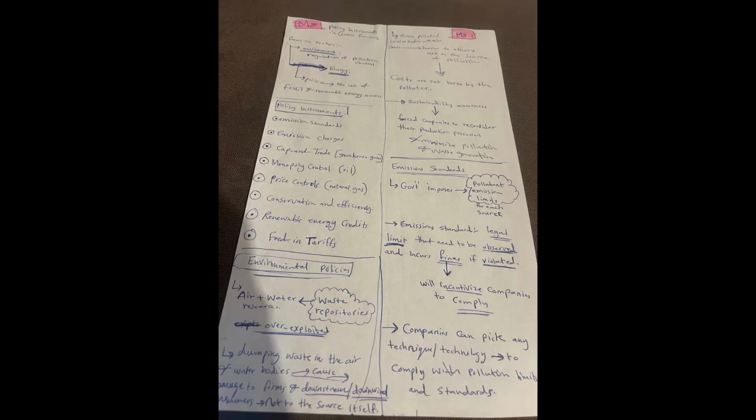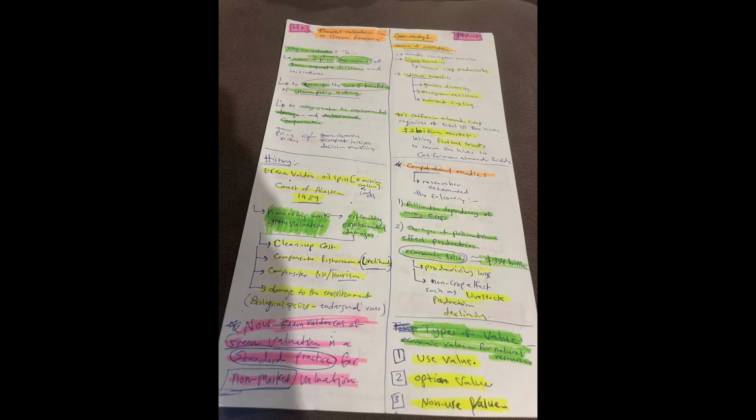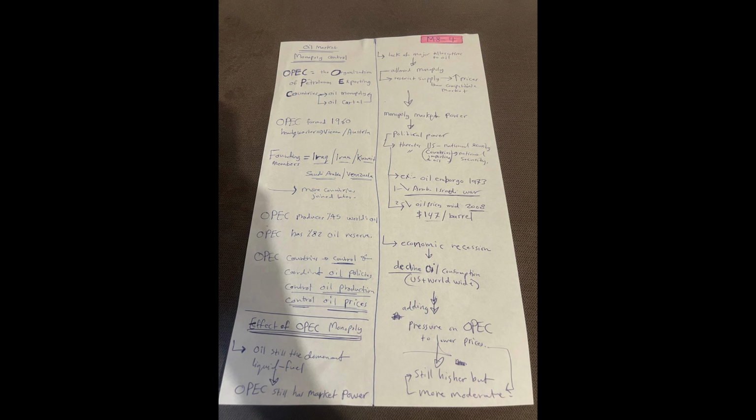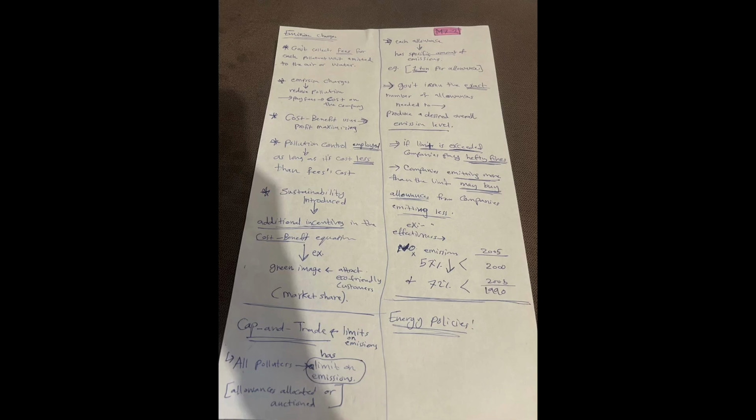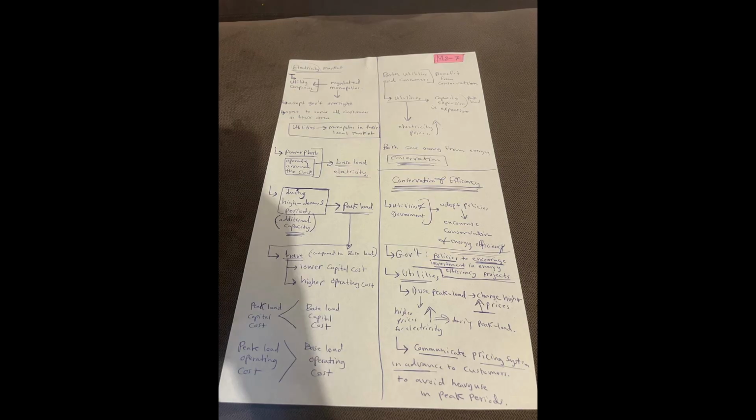Why not? Insurers need to be able to quantify the likelihood and potential damages. So things like fire, flood, theft, professional negligence, usually insurable. But risks like war, civil unrest, government expropriation, technology becoming obsolete, generally not insurable. How does the insurance transaction work typically? Often, a main contractor takes out the necessary policies, construction risk, liability, and names the SPV as an additional insured party. The cost of the premiums usually gets passed through to the SPV. If an insured event happens, the insurer pays out according to the policy.